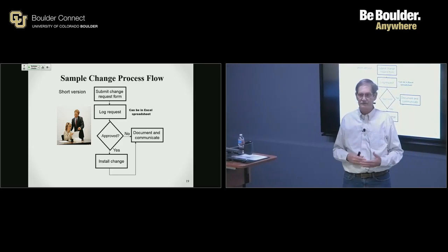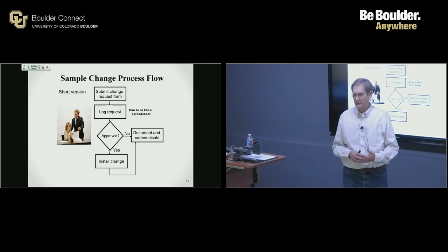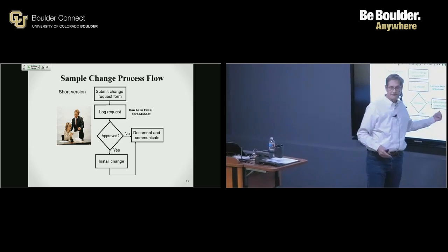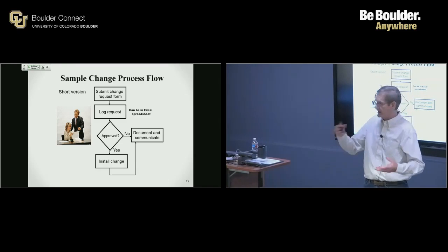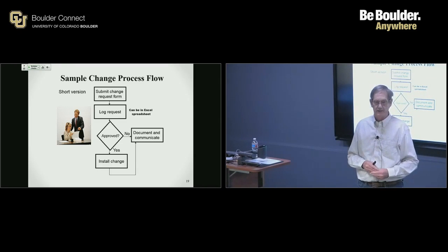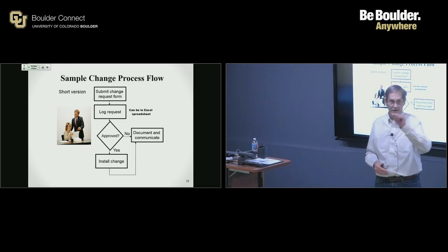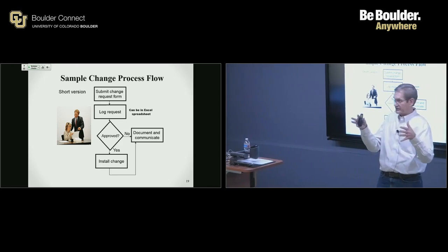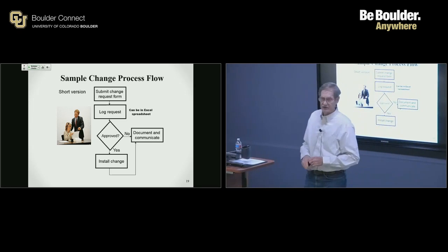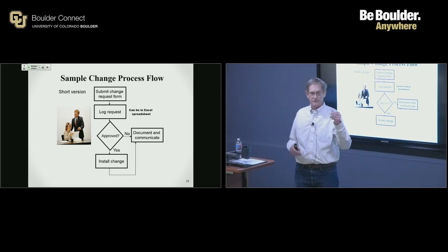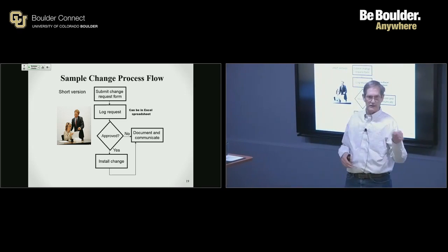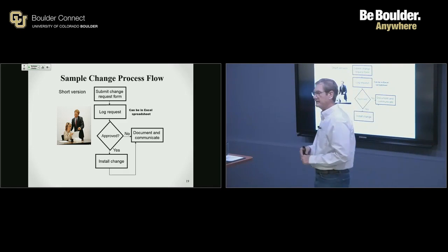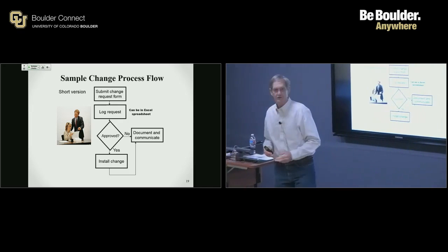So you want to have some change control, some change management process. So we got the team together, ordered pizza and pop, sat down and captured all the changes that had come through from the different team members. And we had 8 pages on an Excel spreadsheet, single line entries. So we put together this tracking sheet, much like what I'm going to show you here next. We entered the change request, who requested it, what do they want, when do they want it. And we had 8 pages in 3 weeks.